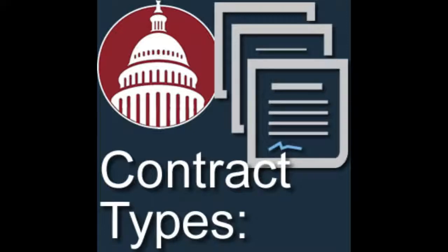On a cost reimbursable contract, if you say you're going to sell it to the government for $100, you're expecting it's going to cost you $90 to build it and that you're going to make $10. If it only costs you $85 to build it, you only get that $85. You'd still get your $10 profit if that was the amount agreed to, but you only get the cost that you expend.